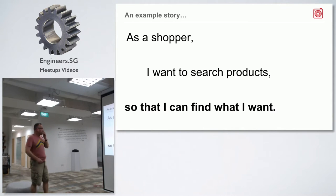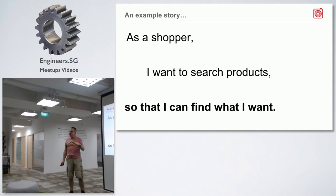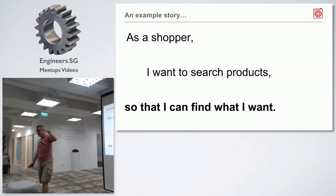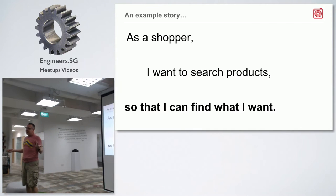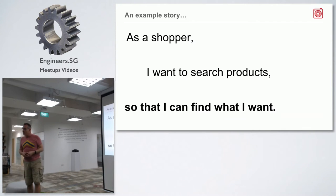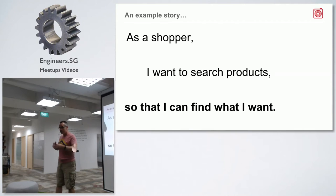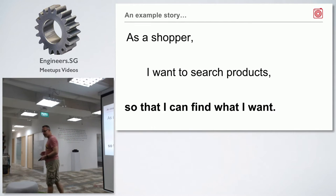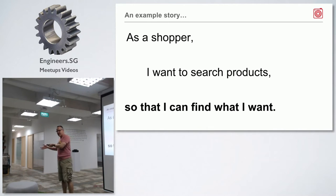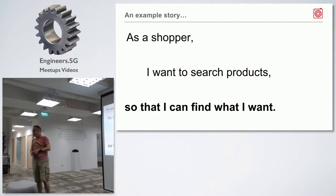If you break it down, then you could potentially say these are ones we can do that are easy. By colors — hold on, do we have the metadata for color? Maybe that's something we want to do in the future, but I don't think we're well set to do that. But category and brand — yeah, we could do that. Or to search within a brand or search within a category. I want to search within a category for products that have this name, or within this brand or across a set of brands. These are all things — you could write these stories.